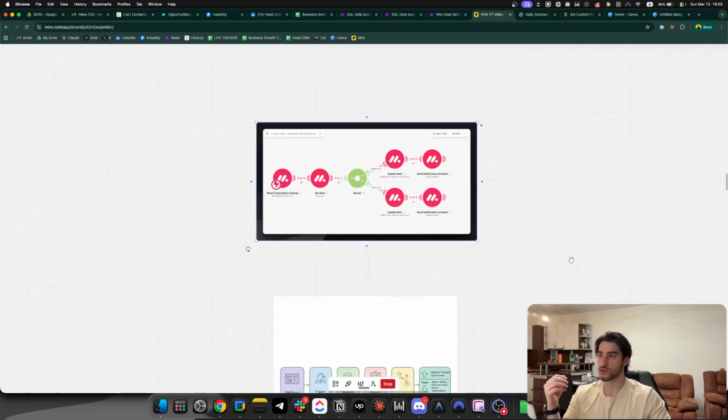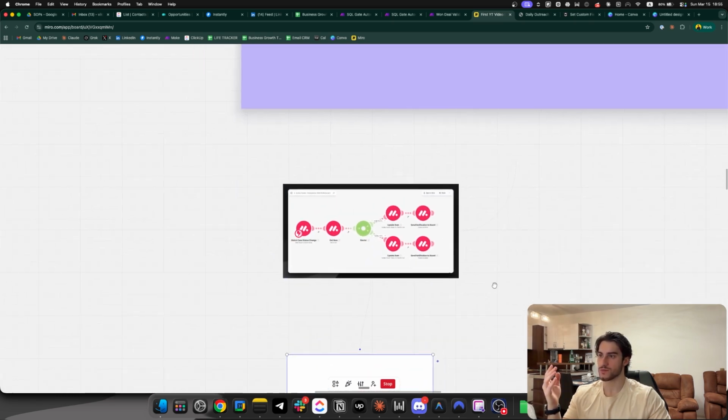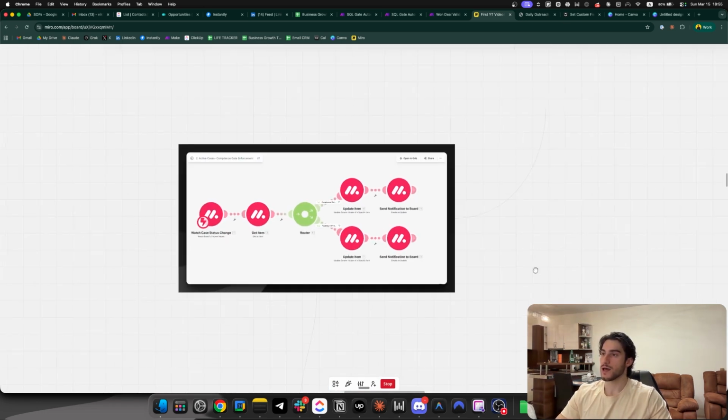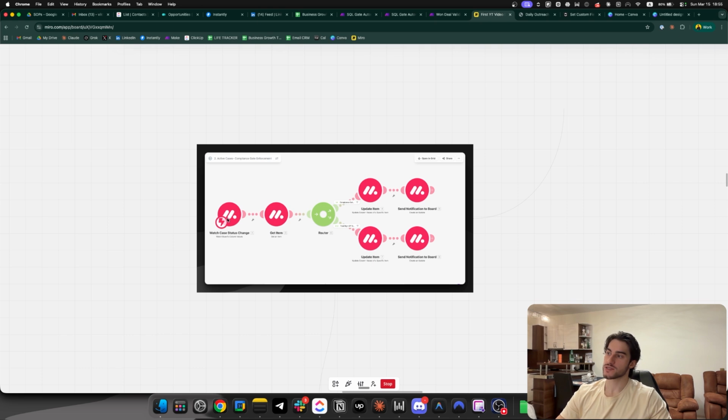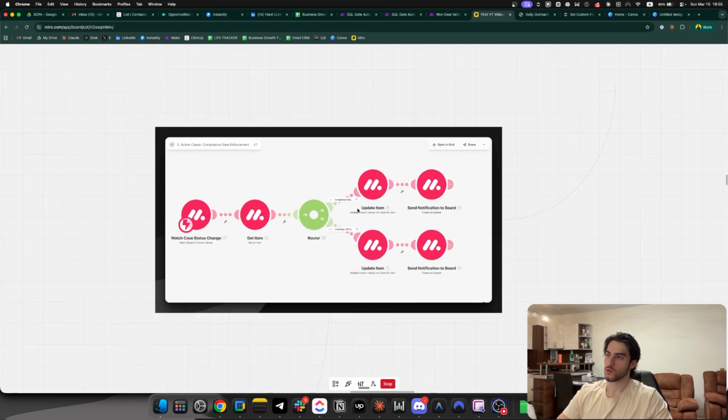They were using Monday.com to store all of their cases, and I built them a simple automation, which I'm going to show you like this because I am not able to actually show the actual automation live. But what we have is we're watching this case status change. This happens in the actual CRM. After that, we pull the item. We are able to check the compliance gate and the final sign-off.